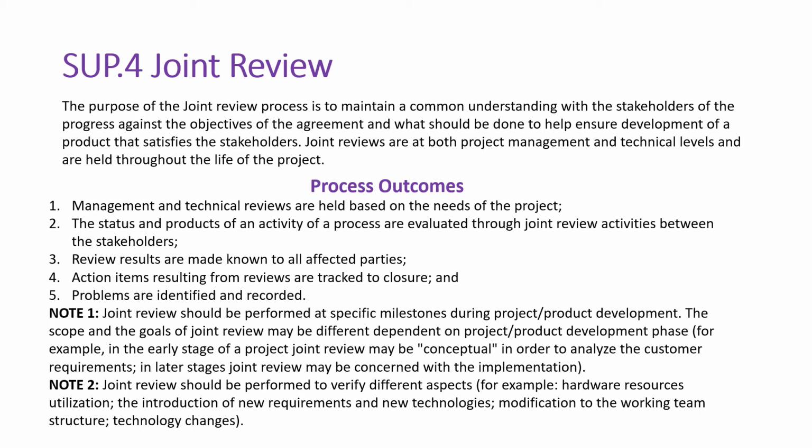Note 1 says joint reviews should be performed at specific milestones during project or product development. The scope and the goals of the joint review may be different depending on the project or product development phase. Note 2 talks about joint reviews being performed to verify different aspects, for example hardware resource utilization, the introduction of new requirements and new technologies, modification to the working team structure, and technology changes.